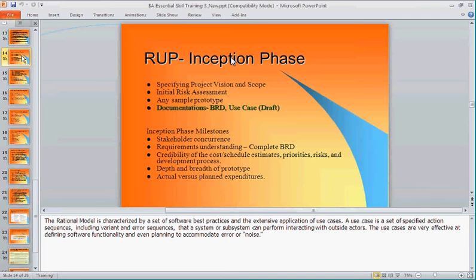Even if you have 7 people on the project and they do 3 iterations, each iteration is 3 months long, then just for one phase, they've taken 9 months. Yes or no? If there are 4 phases in all, 9 times 4, 36 months. So a project, if you only had 1 iteration, it could have been completed in 1 year. Now it has taken you 3 years to build it. You must pay your team for 3 years, right? Do you think they just work for you for the salary of 1 year? No. So it is an expensive project.